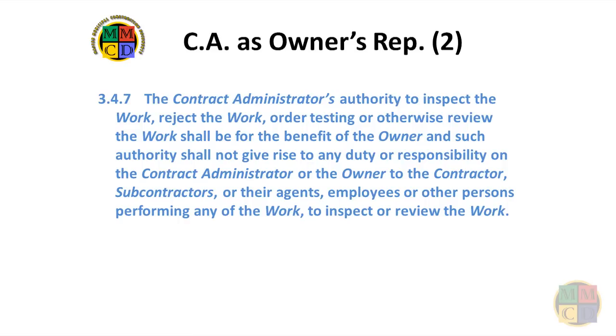The proper way to deal with this is to recognize that in accepting the role as CA, the first obligation is to the terms of the contract. The design problem must be fixed, and there may be resulting costs from the contractor to the owner to perform the fix. If this reflects badly upon the design firm, that cannot be helped, but the CA must not let that factor into the decision to do the right thing.